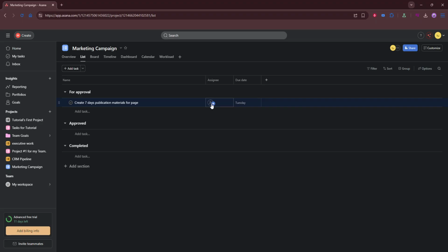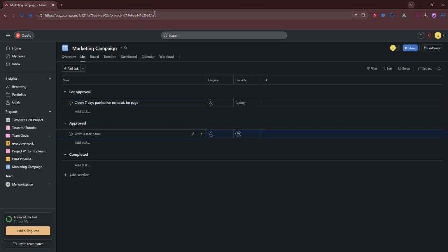Assign owners, due dates, platforms, and priorities so nothing slips. Set one assignee per task to establish accountability, and choose realistic due dates that reflect dependencies across content, design, and approvals. Use fields to mark the platform, such as website, email, or social, and set a priority like high, medium, or low. These labels make it easy to filter and focus when timelines get tight.